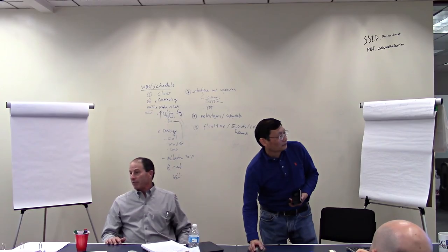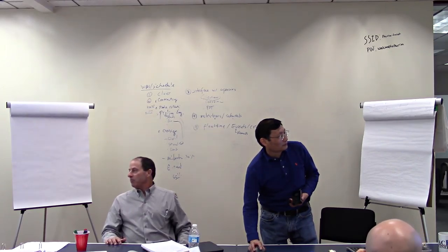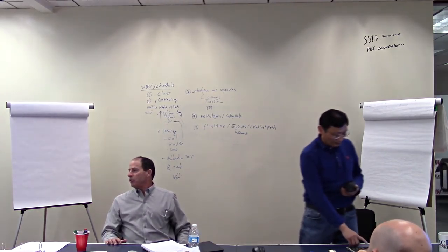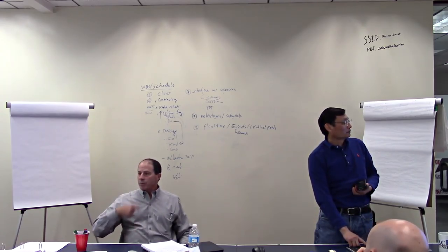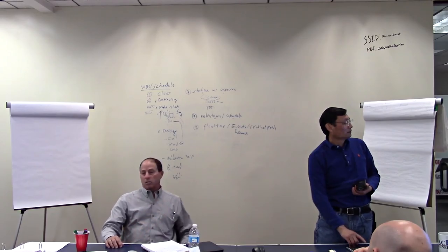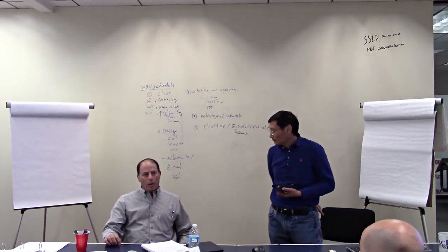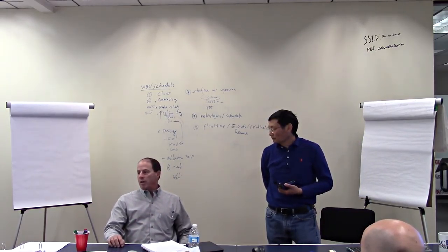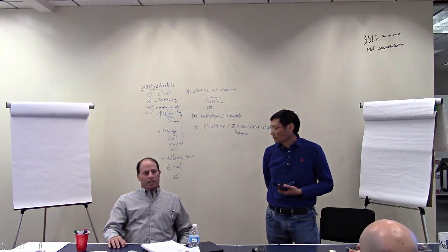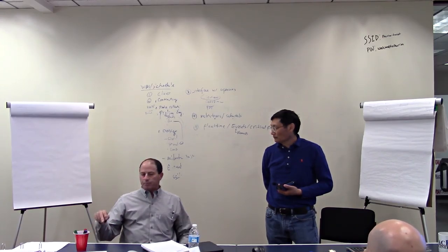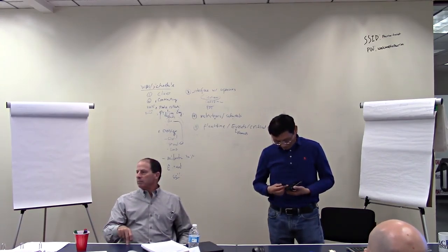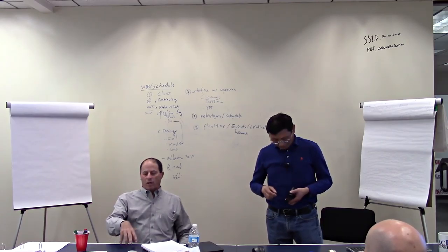Well, some of them, be careful, some of them sign a contract, and if you're a sub, they want you to, that if they're doing work for a school district, not only do they have to rescope that way, they have to give feedback. They get a certain percentage, and if the project comes in lower, they have to give back money because their fee was then too high. You know, it might be determined a year later. But you gotta be careful about those things passing through. We are running into scoping problems like that.